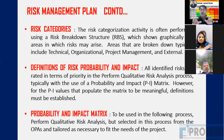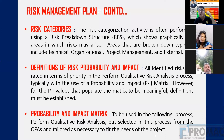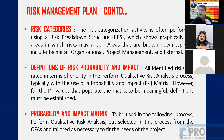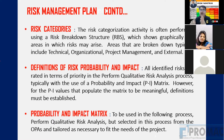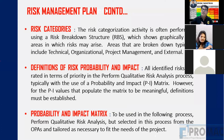Then we should define risk probability and impact. For example, we can say there is very high probability of this risk — 80% probability or 70% probability. We need to decide in the risk management plan: we will consider the risk to be high if the probability is more than 60%, or if the impact is more than a certain amount. We define what we consider high impact and what we consider low impact, and what probability is high versus low.